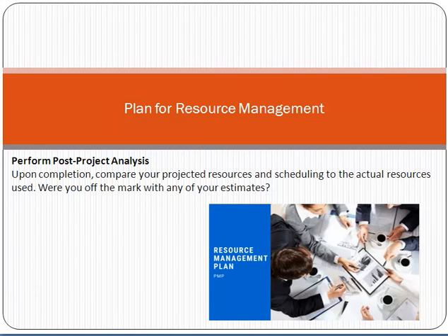Then perform post project analysis. Once the project is finished, you have to analyze how your resource planning was, and make lessons learned accordingly, whether your planning was good or not good. Upon completion, compare your projected resources and scheduling to the actual resources used. This can improve your resource planning skills as well.